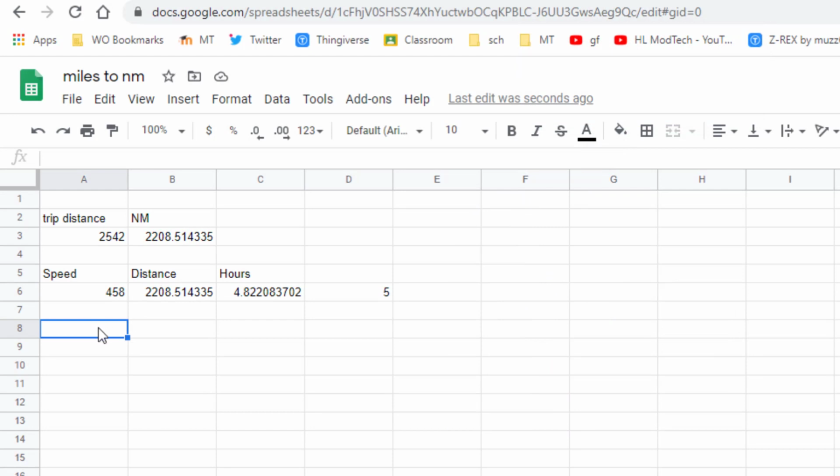Now the last thing I want to remind you about is the rules. Remember, you have to be there 1 hour before, so put an hour out here. The crew needs to stay 30 minutes after as well. And let's put a 0.5 out here. And then this is your flight. And it's 5 hours, which we learned over here when we rounded it up. So when you build your Gantt chart, you need to have 6.5 hours on your chart. If these were the real numbers, I want to emphasize that once again, you're getting your own numbers for the flight.